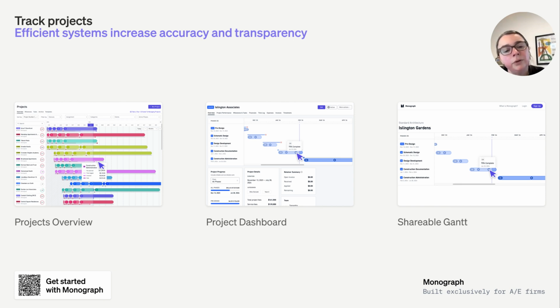The project dashboard is essential in its own right too. Everybody working on the project can see how the phase is laid out. The vertical line there, I don't know if you can see sort of where the mouse is essentially today, and then you can see like the horizontal line above each of the phases is what's called the money Gantt. For those of you who don't know that, it shows you how you're tracking on your fee relative to the fee that you put into the project planner. It's also interconnected. I'm sort of dumbfounded that we didn't have this earlier.